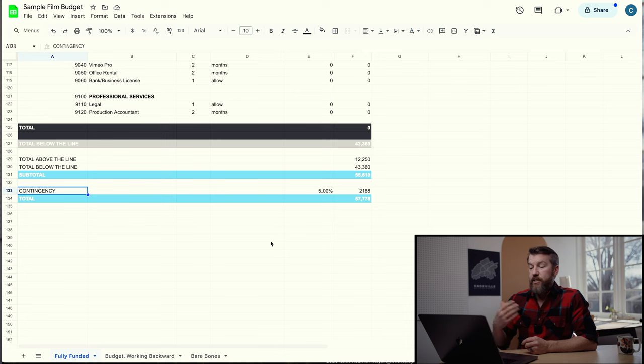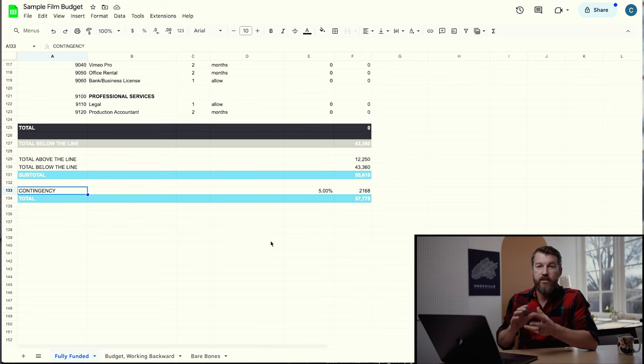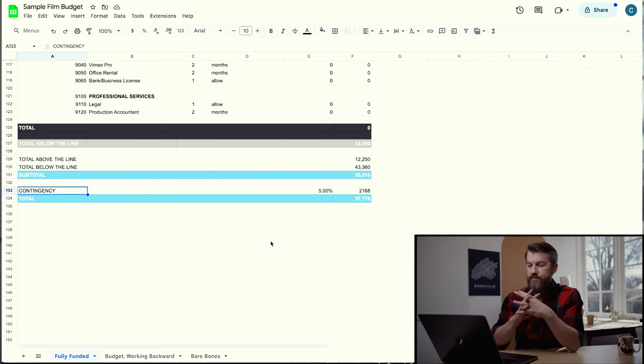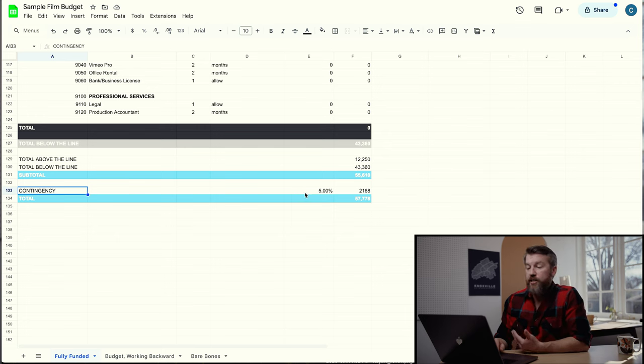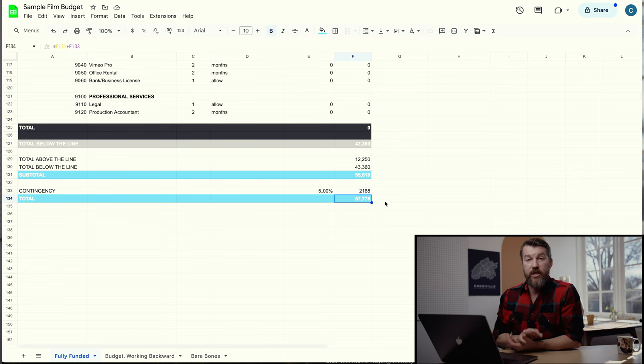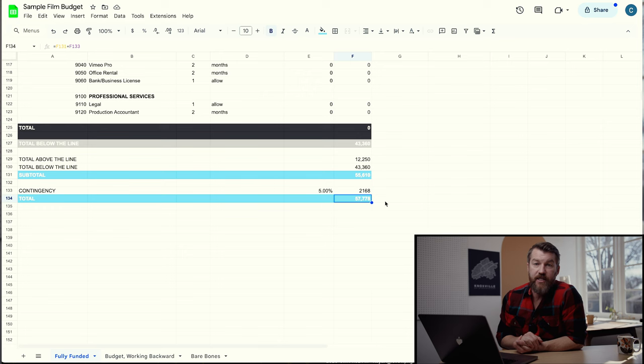At the bottom we have contingency — any sort of mistakes you might have made in the budget, like underestimating gas or hotel costs. You add 5% of your budget on top so any small mistakes can be worked through. For this project, the contingency is 5%, which comes out to $2,168, bringing our total budget to $57,778 — a pretty good budget for a fully funded commercial branded content documentary.